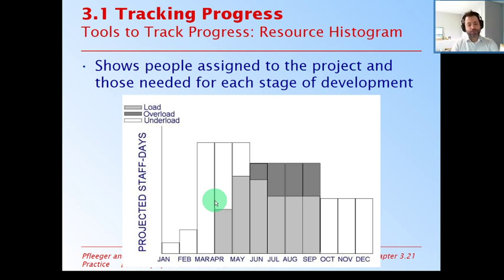Well, the thing with the crunch time deliverables is that there is probably a well-created plan at some point. Due to bugs or whatever reason, that plan probably slipped. And then the people higher up refused to accept the slippage. And they said, nope, you have to get it out on the agreed upon date. That's most likely the way it works.